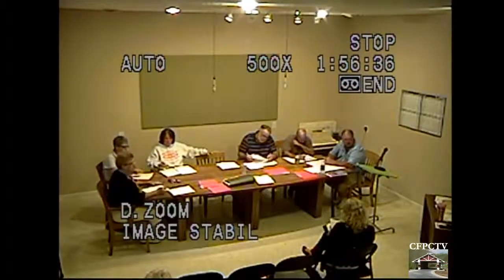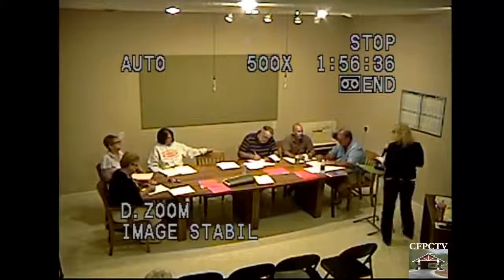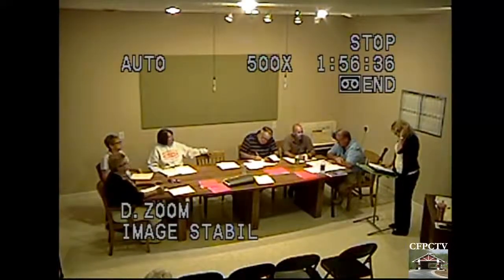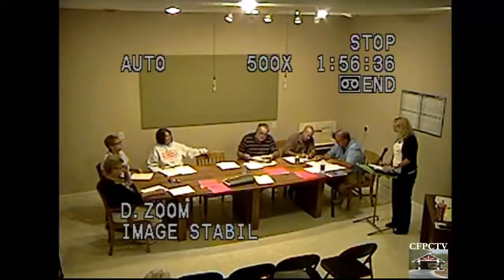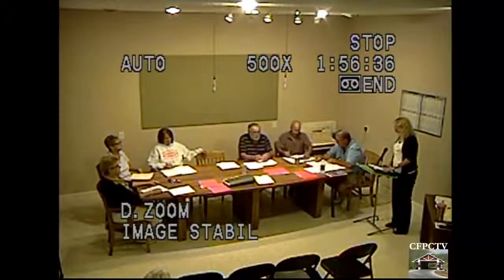So Susan, if you'd like to take the stand, go ahead. Basically, I'm here to update you a little bit on the street project. The milling is scheduled to take place on Wednesday. The milling unit will be here. They're going to be continuing the sidewalk work. Then they'll come in with the paving, and they'll do the wedge as well as the paving on East Main Street, and then the paving on Shady Lane and on Lincoln Lane.